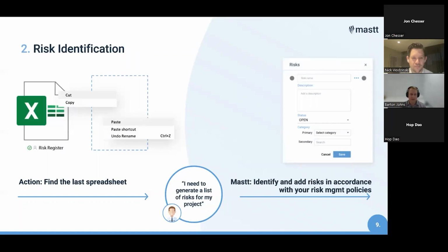So your direct client, the project sponsor, and any key stakeholders from the particular site or sites where you are conducting the work. This would be done on a project by project basis, and then, in my experience, feed into a program dashboard view for our client on risk.